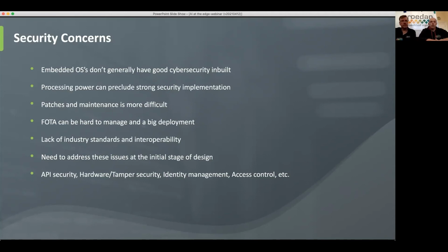It's getting better. Yeah. And I'm glad you mentioned the security, because this is one thing a number of our guests on the CTO Confessions podcast series have mentioned: that security is very rarely brought in at the beginning of a project. It's always an afterthought. Yeah, and it's really difficult to retrofit, because if you're retrofitting security, you need a secure way of getting that retrofit into your device. And because the device has got no security, it's open to compromise. So it's sort of a vicious circle. Yeah, so you need to think about it up front.